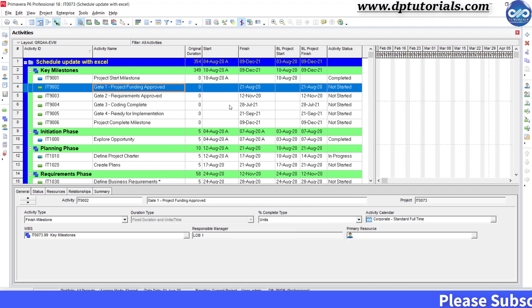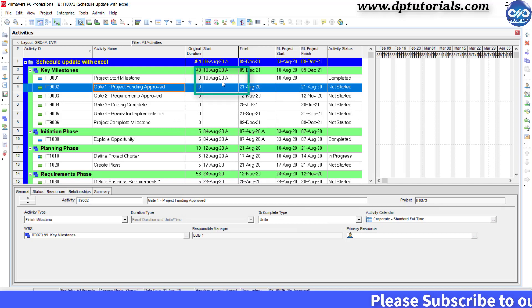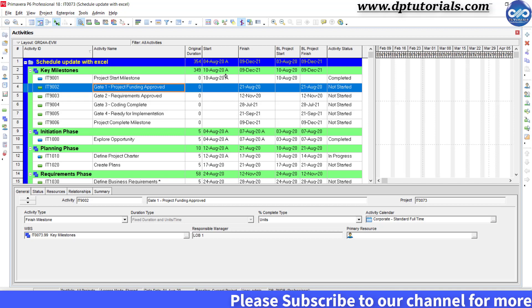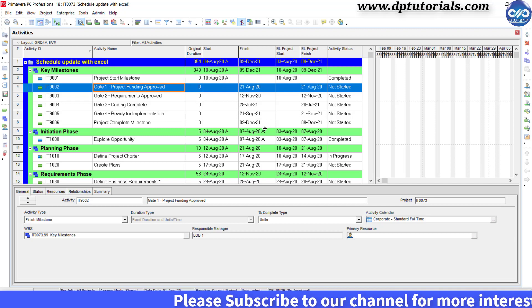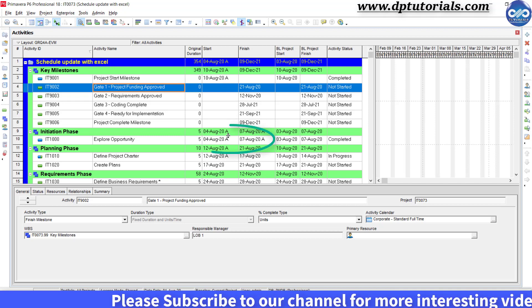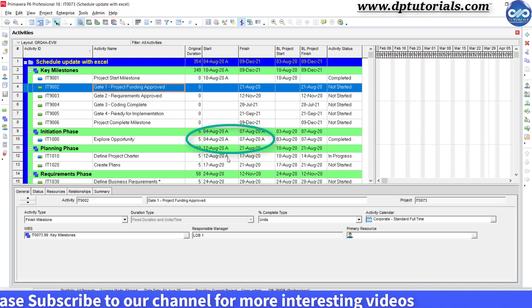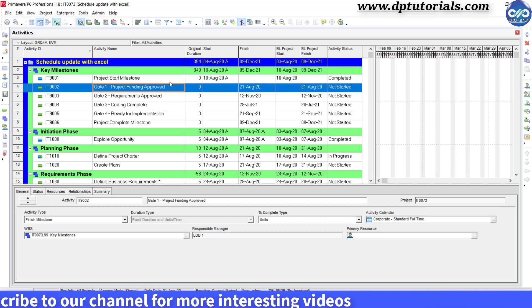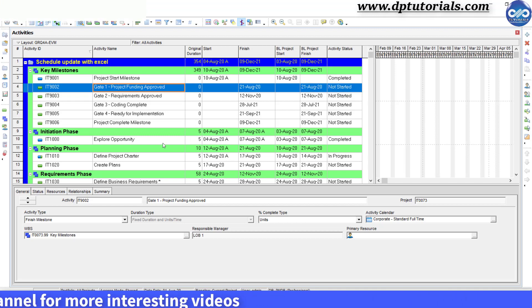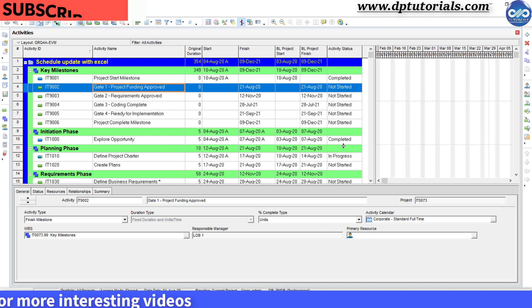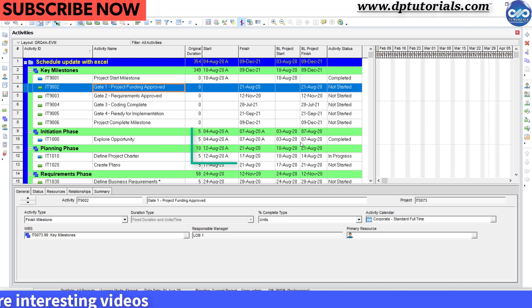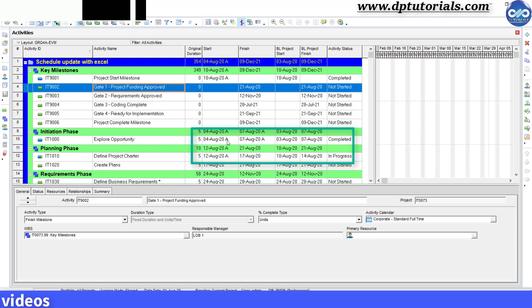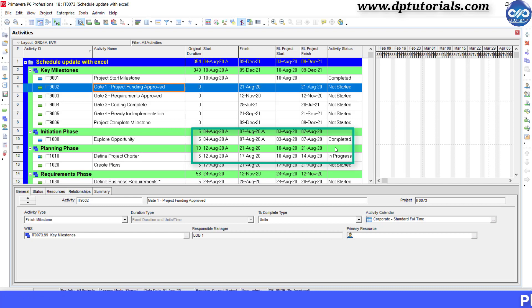Now you can clearly observe that the activities that we have updated in the Excel are shown with letter A in Primavera like this. See, Start Milestone as completed, Explore Opportunity as completed but started on 4th August, and Define Project Charter activity as in progress.